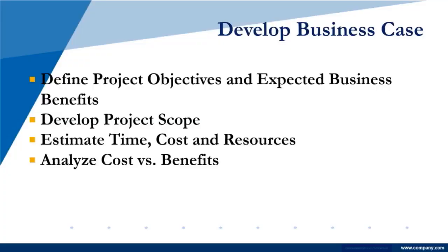your business case. You would also have the possible cost-benefit analysis, the costs against the benefits, and really have some specifics there. It may be that you are doing this in its estimates, and it's based on, if we bring it in 3 months, it can be this. If we bring it in 6 months, it'll be that. And it can be a sliding scale. It might even be a matrix of some sort that you've put together.